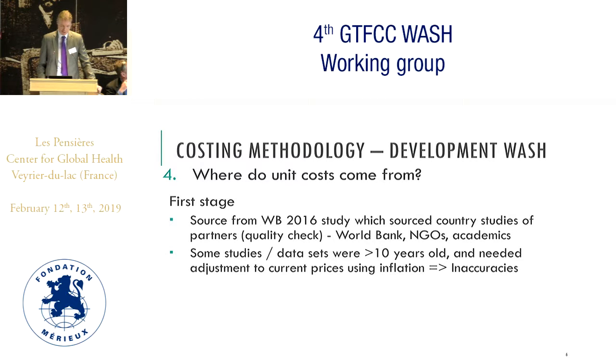A lot of the studies we used for that study were old, so we had to inflate from the year of the data to the current period. Because the inflation rate of WASH services might be different from the general inflation rates, there may be some inaccuracies introduced by this methodology.